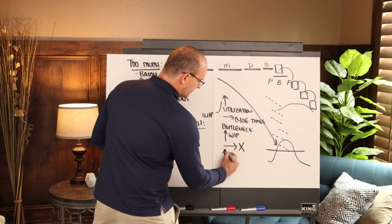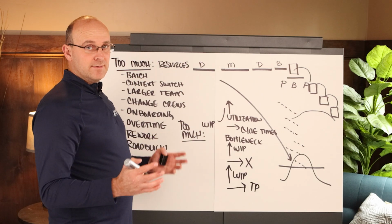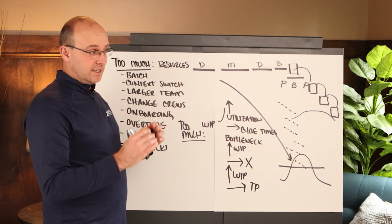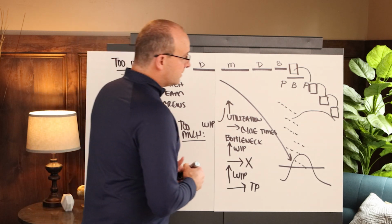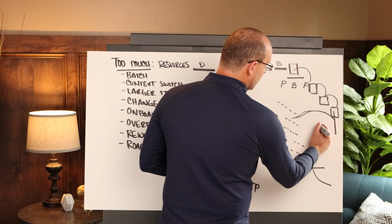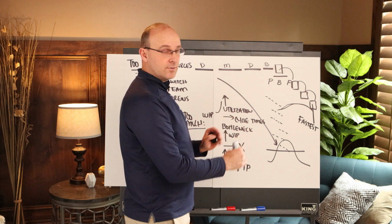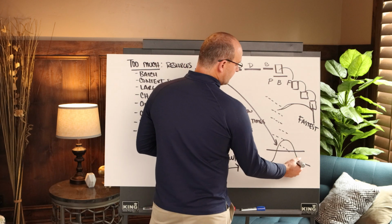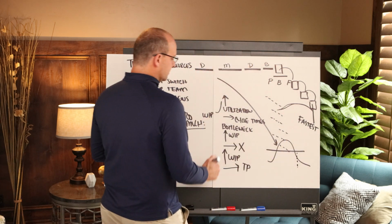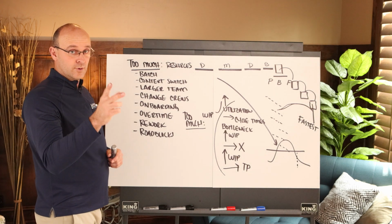The other thing is when you have too much work in process, your overall throughput times extend. What that means is the more cars you put on a freeway, the longer it takes for a group of cars to actually get from end to end. And so when we talk about takt plans and production systems with leveled work and it has a certain end date, that is the fastest, okay? When you see silly CPM schedules which are increasing your work in process early on, it actually is not going to finish here, which is what people think. It's going to finish way out here because it's only going to extend because of these three things. Okay, so let me keep going and I'm going to talk to you about two more too muches.